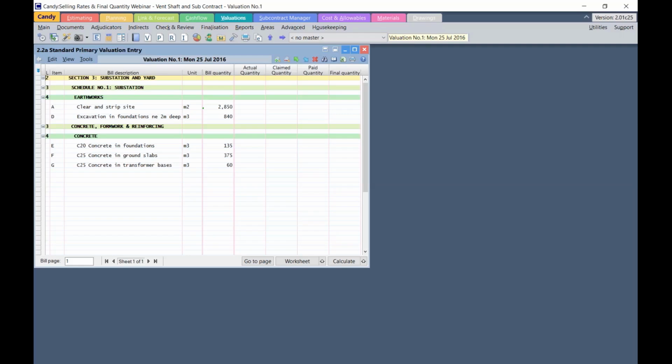At this point, any BillSmart user will need to copy all bill quantities to the final quantity column for them to upload their resource budget. If they leave the final quantities blank when uploading the resource budget, only the rates of the resources will be uploaded and a message will be displayed in BillSmart Procurement that all resources have no quantities. While in Candy, remaining quantities are generated using final quantities less actual quantities. Hence, it's important to have final quantities at post-tender stage.